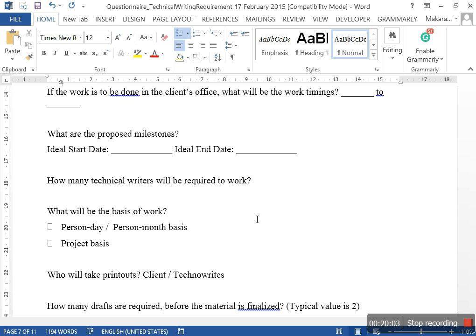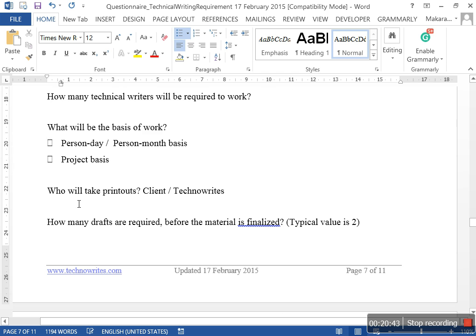What if you need 3 writers? Are you going to use 3 junior writers? I would not recommend that. What would I recommend? Maybe 2 junior writers with 1 senior writer, so one person can review their work and so on. As I said, a number of times the client will depend on me for inputs. Sometimes the client says, okay, give us 4 senior writers, and my recommendation to them is, please don't go for 4 seniors. Go for 2 seniors, 2 juniors. Why? Your overall cost also comes down and it becomes easy to manage the projects also. If there are 4 senior writers, all 4 will have their own egos. At least the junior guys will listen to the senior guys saying that he is senior. So fewer project management issues.